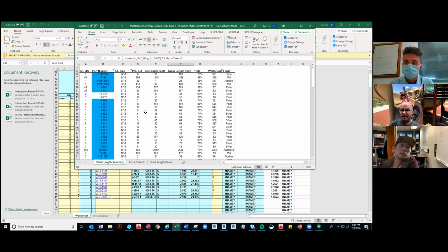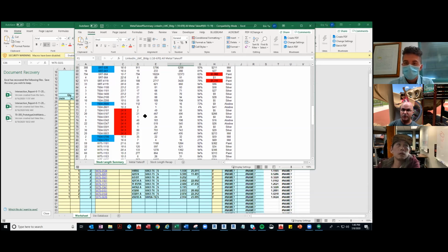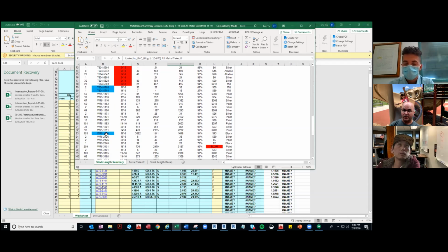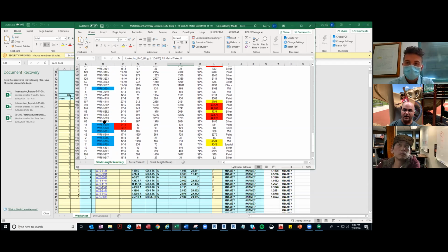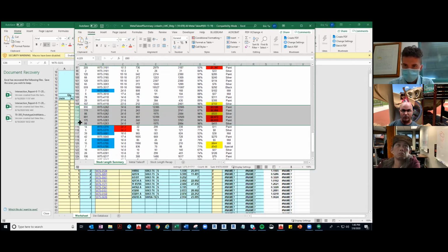We also have different stages that we do our work in. So the initial setup stage will have a bunch of the data established. We want to give that to the team that's doing the material takeoffs, the glass and metal takeoff. So we'll have a handoff and we'll give them that information based on what we're seeing on the Trello board. So we hand it off from phase to phase so that we convey what we have done so far and what state the data is in when you're taking it over to do your part.